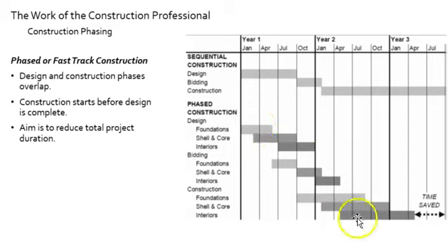And all of this requires significant coordination, and all of this produces, in this conceptual diagram here, a savings of a month and a half and change. So more coordination, but there are significant benefits. So this could be the owner hiring the design build team and saying, I need to get my tenants in there as soon as possible. So whatever downfalls there are to the design build construction, the owner deems it worthwhile. This could be a lot of money for an owner getting tenants into a building.